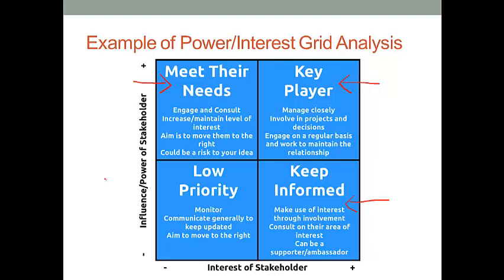For this stakeholder group, you want to consider how to increase their engagement in your project management process. You want to let your suppliers know that your success will determine their success as well, so that you can transform the weakness of being determined by your supplier into a collaborative relationship with this supplier.